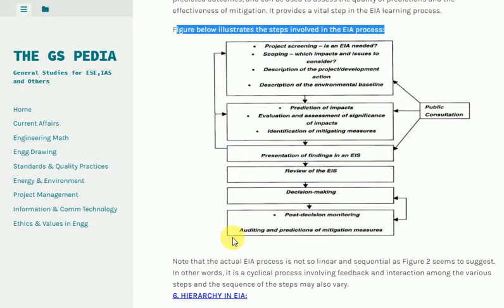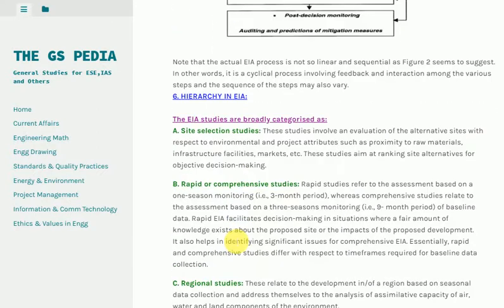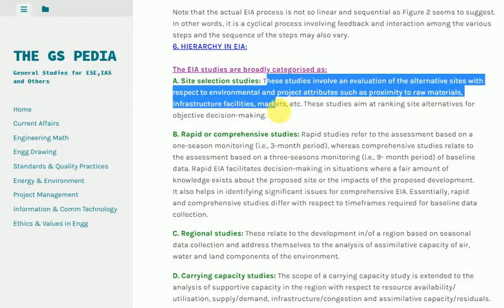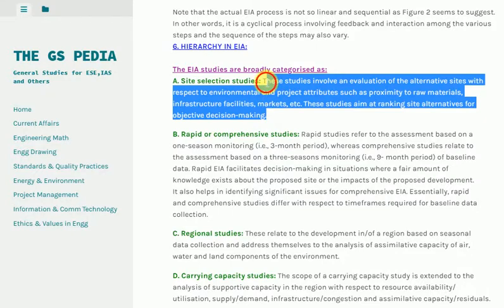Hierarchy in EIA: These studies are broadly categorized as follows. A) Site Selection Studies: These involve an evaluation of alternative sites with respect to environmental and project attributes such as proximity to raw materials, infrastructure facilities, markets, etc. These studies aim at ranking site alternatives for objective decision making.